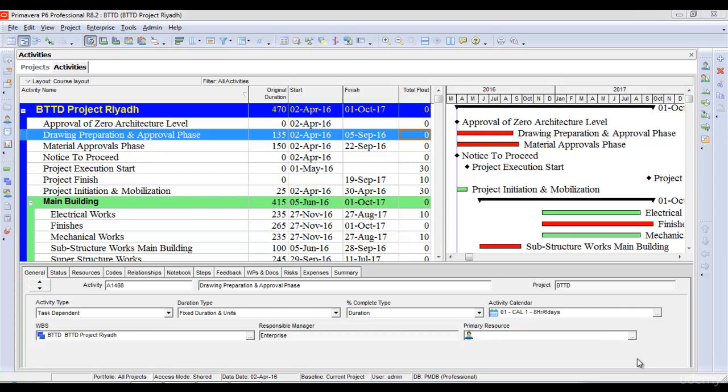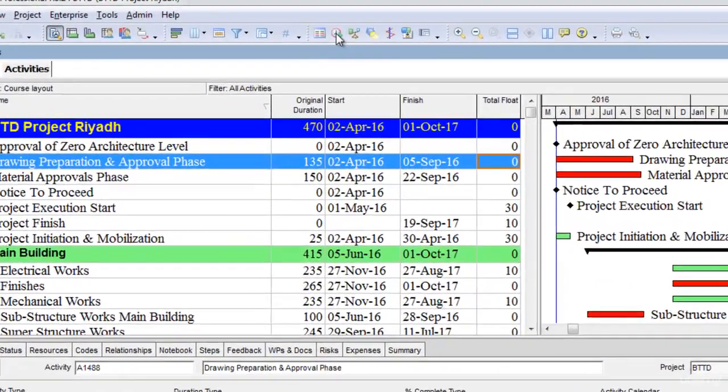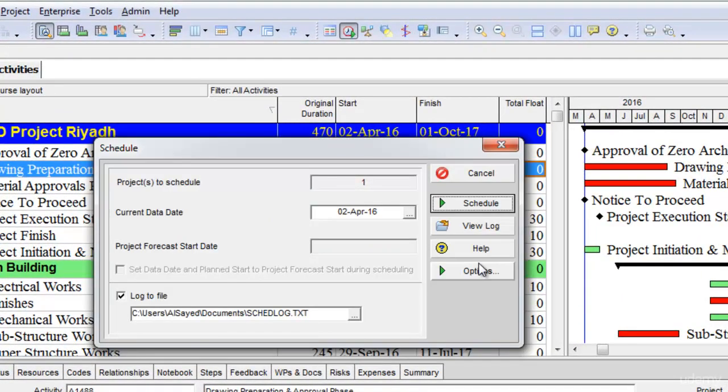Sometimes you may get a project from some other planner or scheduler and you want to check it. You will get a lot of information about the project or the schedule from its log. To check the schedule log, we go to the schedule option here and it opens the schedule window.